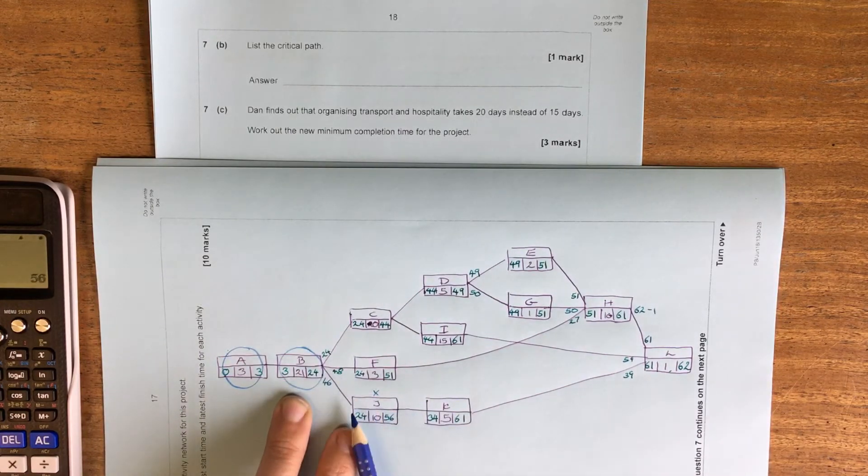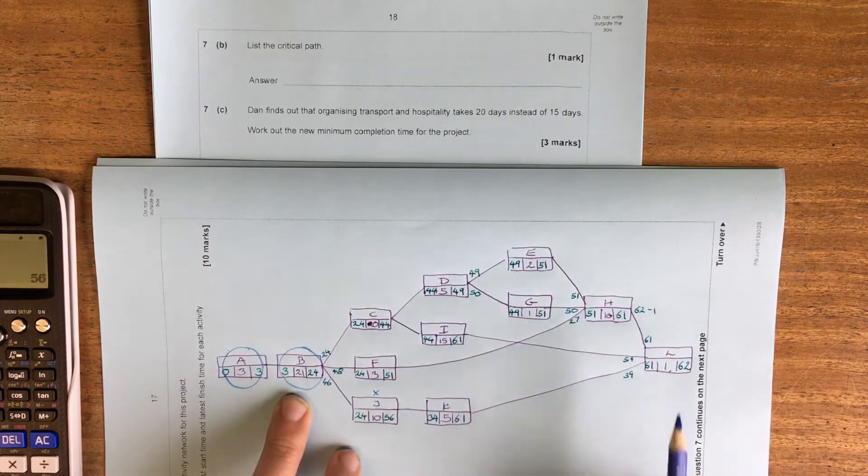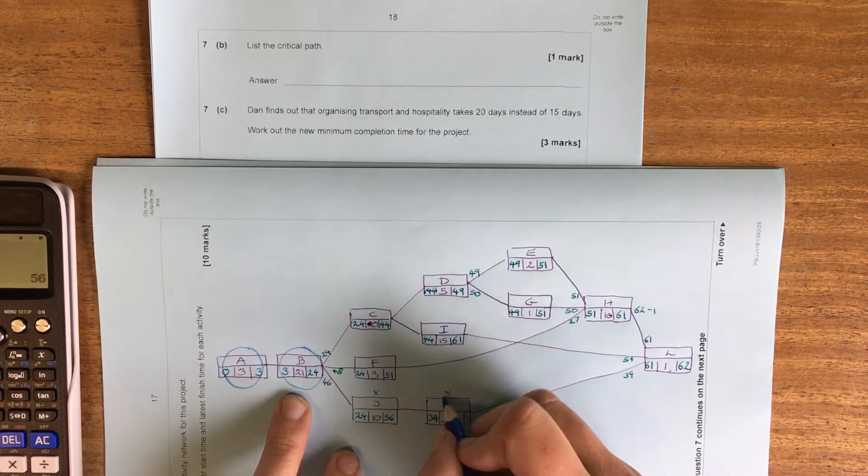Anything that's not critical on a branch means that the rest until it joins up again, also not critical.